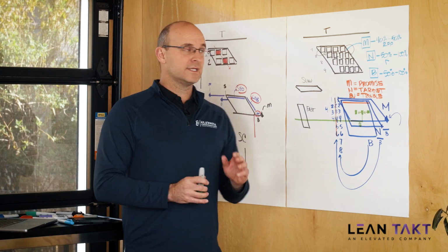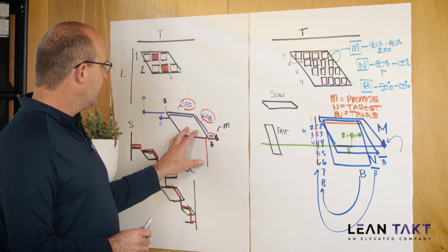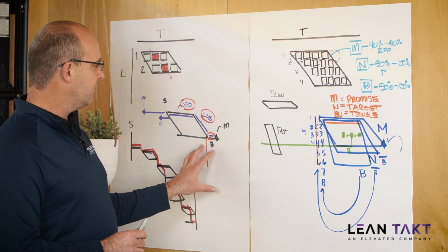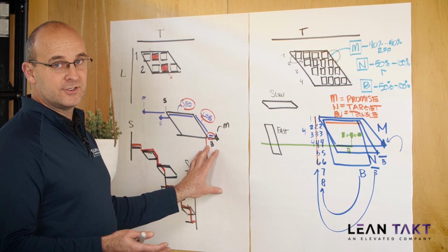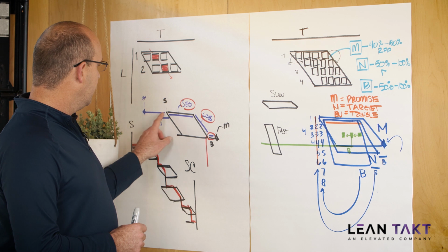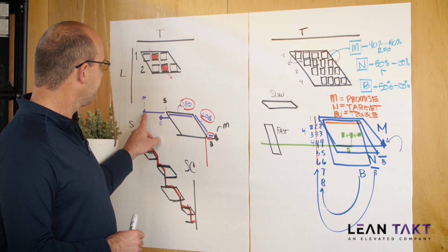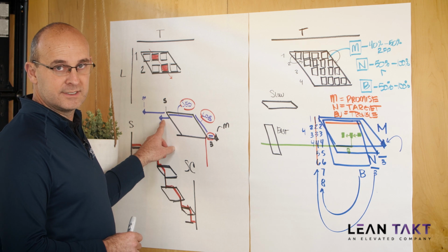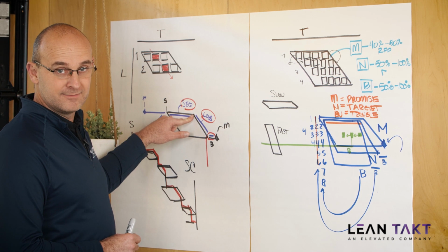Now, what I want to say here is when you look at the structure, you can verify, this is all verifiable, and we're going to write evaluation criteria if you ever go into a court of law. That'll be out soon. But once you have your phase, you need to always pull plan with the trades, always prepare your work from a quality standpoint. This sequence can be verified with that pull plan.